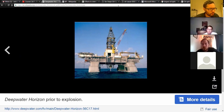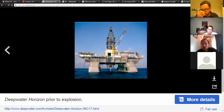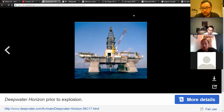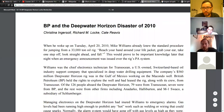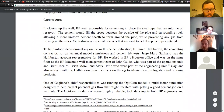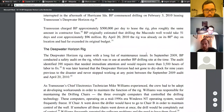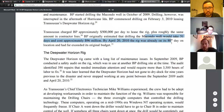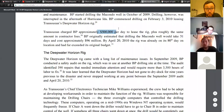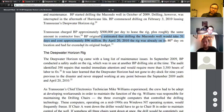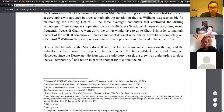Deepwater Horizon was supposed to be on this drilling operation for 51 days and was supposed to cost almost $100 million to operate. It ended up that when it exploded, it had been on the water for 80 days — so it was way over time and also way over budget. BP doesn't own the rig. The rig is owned by a company called Transocean, which contracted out to BP for half a million dollars a day. The rig was originally estimated to be on the well site for 51 days, but by April 20th when the rig exploded it had been there for 80 days and was far behind its repair schedule.